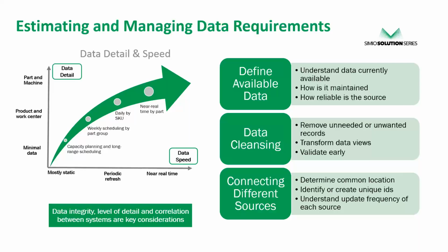So yeah, the amount of data that you have available to you really can dictate the amount of scope, the amount of capability that the model can have, as well as how much time you need to account for bringing the data in, getting the data ready and bringing it into the model. And getting the data ready is really the second piece here, which is the data cleansing.